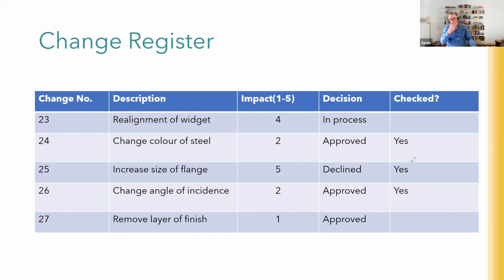Now that's an interesting concept, but I've seen a project firsthand where a change request came through. The team just assumed that it would be approved and they started doing the work. It went to the change control board who actually declined it. Now the team didn't bother to check and the project manager just assumed everybody would know. So the team actually did the work and it caused a massive fuss when the client said they requested this but understood it wasn't going to be done. Why was it still there? Because they'd now made plans to be without it. So even if something is declined, go and make sure that the work wasn't done accidentally in anticipation of approval.